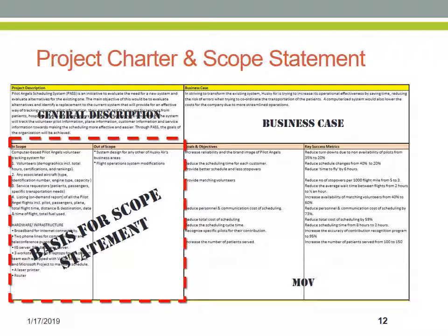And at this point, it's important for a project manager to whip out the in-scope, out-of-scope definition and review the feasibility of the new request. And if the new request is not part of the in-scope and out-of-scope description, then the answer to that will always be, let's review the extra work that this will generate, and let's make sure that we evaluate its impact on budget and schedule.